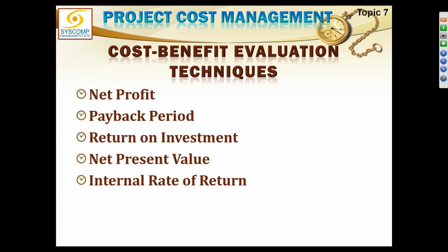The first one you have already learned, that is the net profit. Then there is the payback period. Payback period is used when we want to recover our investment as soon as possible. Maybe I have taken a loan from the bank for starting this business, and my first priority is to pay back the loan as soon as possible, no matter if I am getting any profits or not. Because I will own the business after I repay, whether I get low profits or more, the business is mine and I can keep working on it. So payback period applies only to situations where the recovery of investment is of prime importance.